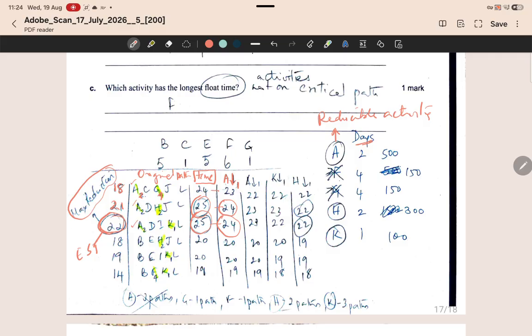Now the objective is to make the old critical paths the critical paths again with the maximum reduction possible. Okay? Now both are 24, but we know that we can go down to 22. So I choose A again by 1, and we know the first 3 paths will get affected to 22, 23, and 23, and the remaining stay the same.